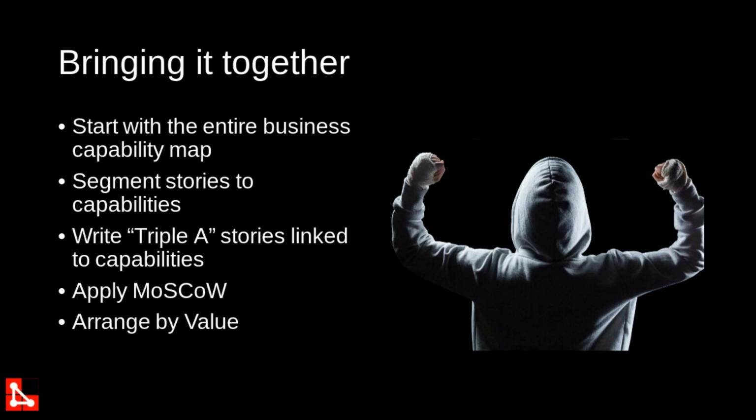Because I go to a lot of companies and I look at the requirements list, and maybe they have 300 requirements, and there are only 15 that are not must-have. Well, you know what's going to happen, right? You're running through the project and there's not much room to play in that budget. So what I then have to do is say, okay, look, this is a budget for the must-have. I'm just going to ask you to budget for this much of a buffer.